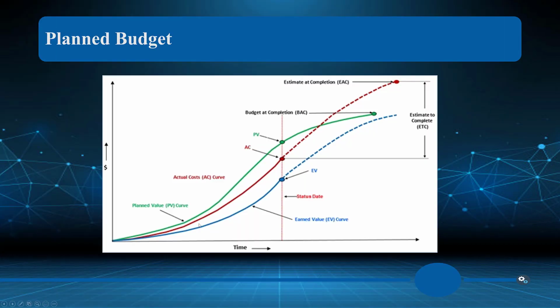As we look at this, we can start charting things like our planned value. Over time, this would be a planned value curve. Now, this is not the planned value curve for our project. This is an example of a planned value curve, dollars versus time. If we call this month 2, we would go month 1 here, month 3 here, and we would have an idea, spending $10,000. If we did it linear, we'd see 10, 20, 30, and then 40. And then a curve. In our case, because it would be the same amount, we would see a linear line. Then we would start seeing curved lines as we started spending money, as we'll see in a minute. Our first month's bill is not going to equate to what we expected it to be, and you'll see that.